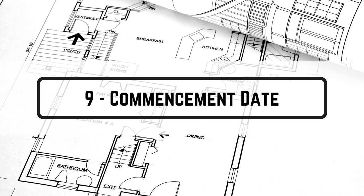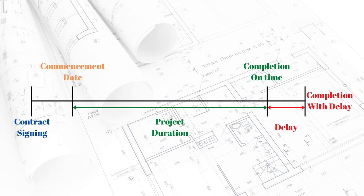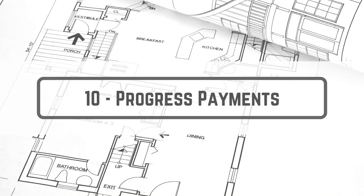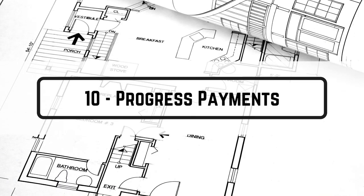Term number nine is the commencement date — the date of starting or commencing the works. You have agreed the duration, but when does it start? It could start from signing the contract, a specific date, or upon receiving a notice to commence. What matters is the point in time where the project starts, because from that point the duration starts counting. The commencement date is very important for monitoring project progress and delays.